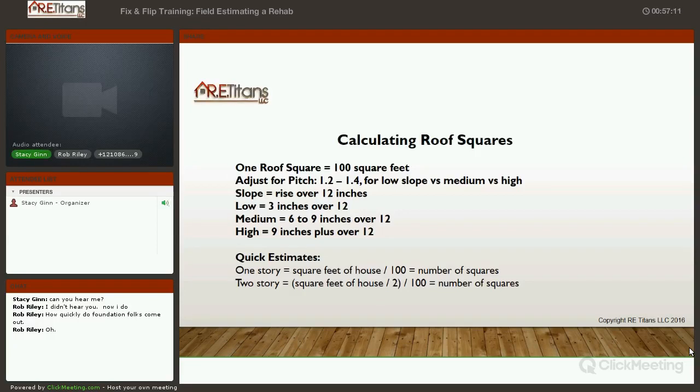you might want to do some measurements, and there's two ways to do that if you want to start looking at a funny shaped roof house and figure out what the squares are. The free way to do it yourself, I believe it's Google Earth, is where I've done it before. You can go down on top of a house and draw a map on top of the house, and it will tell you how many square feet it is. I've done that where you find the property address and you go in there,